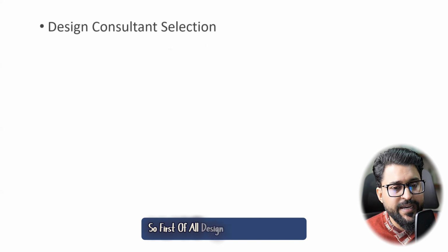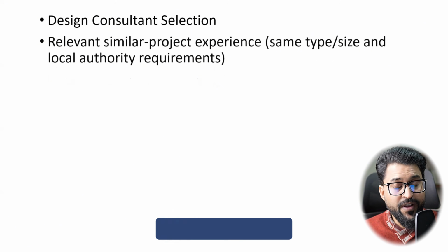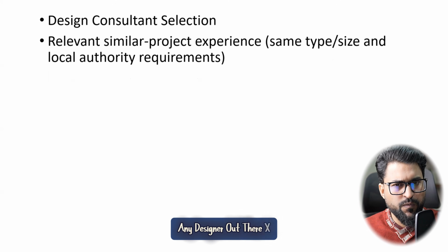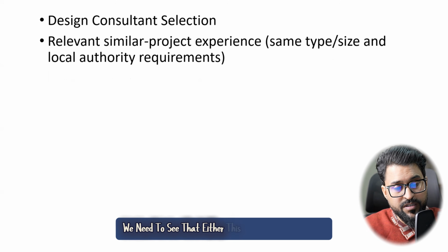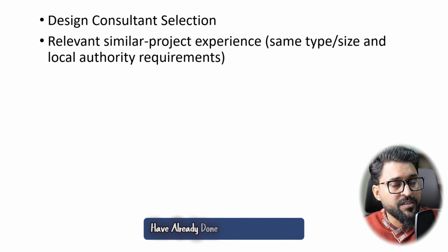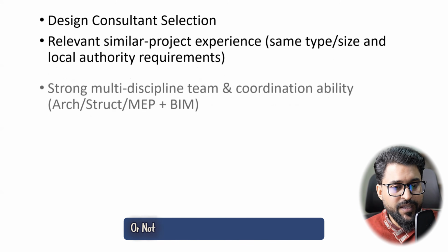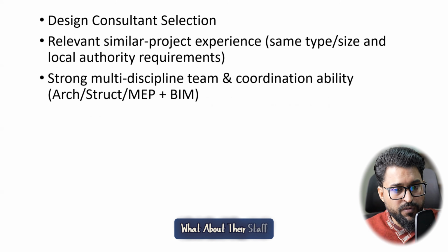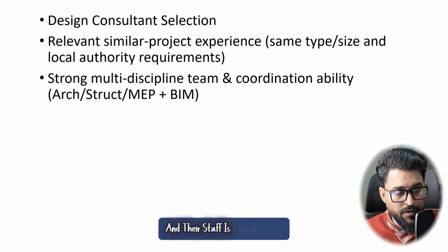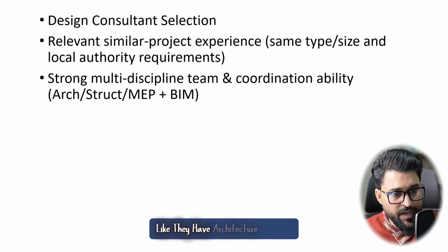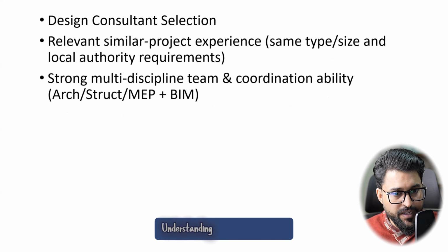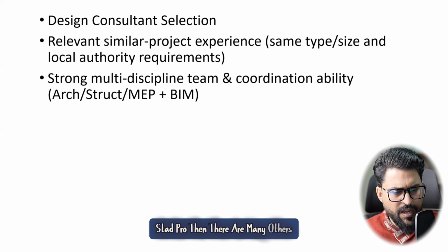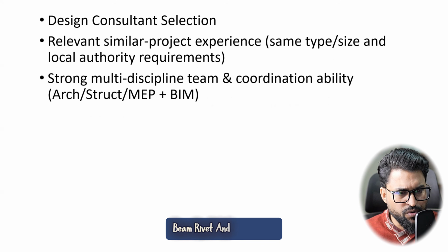So first of all, design consultant selection. Relevant similar project experience, for any designer out there, XYZ, we need to see whether this designer or consultant has already done the same kind of projects or not. Then a strong multidiscipline team. What about their staff, and is their staff skilled enough? Like they have architecture, structural software, STAAD Pro, and then there are many others, MEP, BIM, Revit, and so on, right?